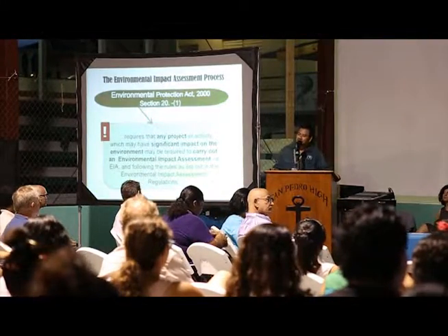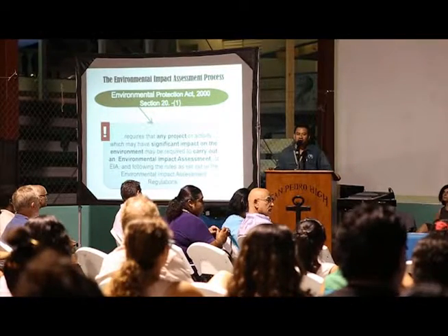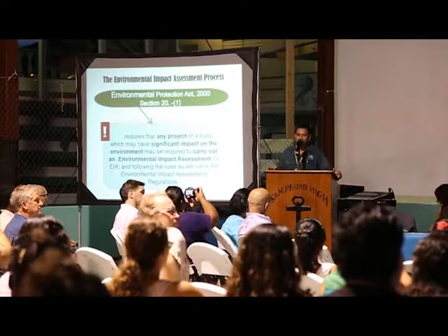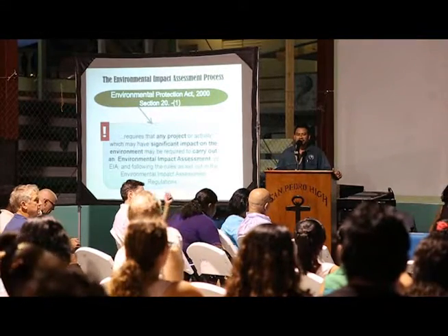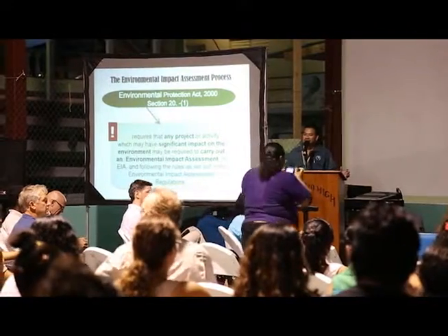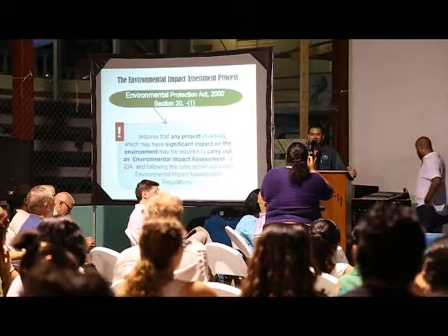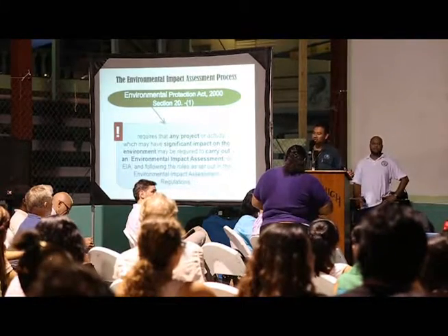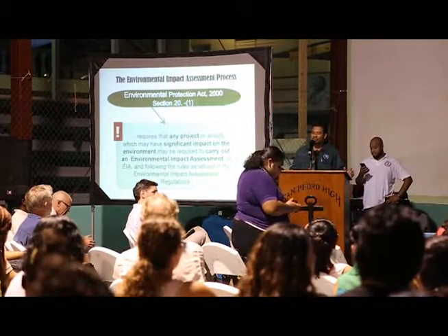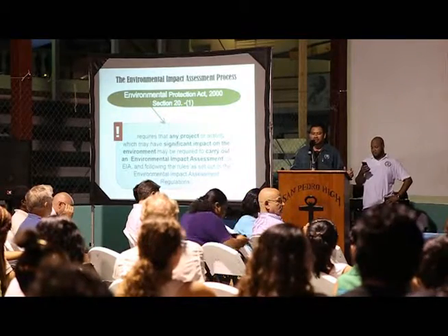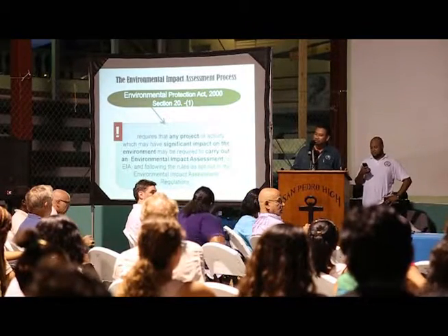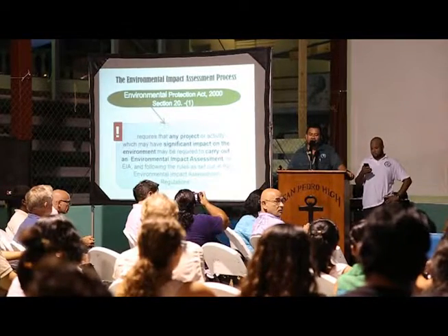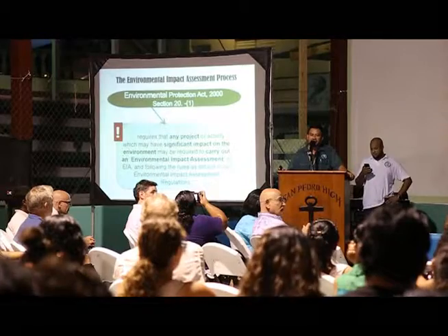It's not something that we decided one day that we would ask developers or investors who want in a country to do. Right? There's a legal basis for this. What is the legal basis for this? It's in the Environmental Protection Act. This act was established in 1992. And Section 21 of this act says that any development project within a country that may have a significant impact on our environment is required to conduct an environmental impact assessment.